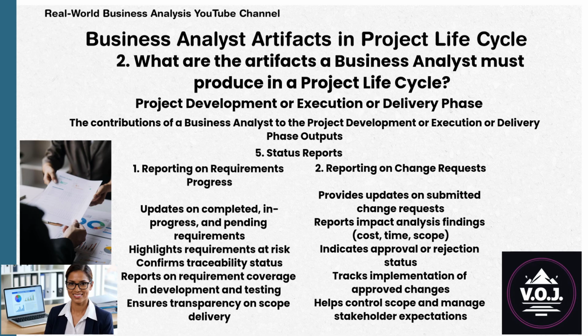The contribution of a business analyst to the fifth output, which is status reports, are: 1. Reporting on requirements progress. The BA updates on completed, in progress, and pending requirements. Highlights requirements at risk. Confirms traceability status. Reports on requirement coverage in development and testing.